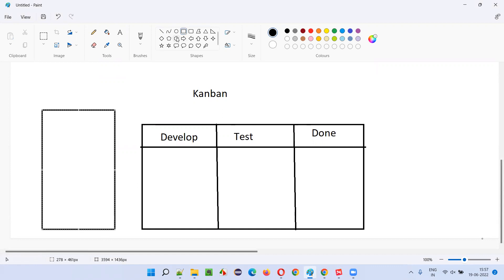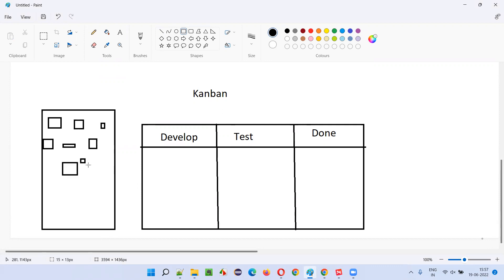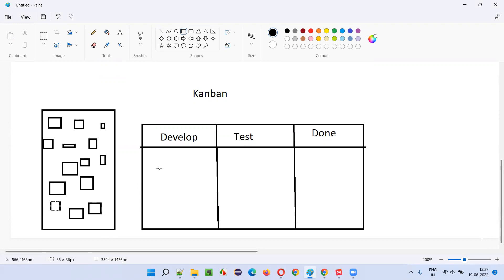All the requirements in the form of stories will be there in the backlog. The work is a continuous process — there is no time bound, no two weeks or three weeks. Requirements have to pass through the columns and move to the right side. Whatever requirements are there, they come from the left side and move to the done state on the right. It is continuous until all items are completed.